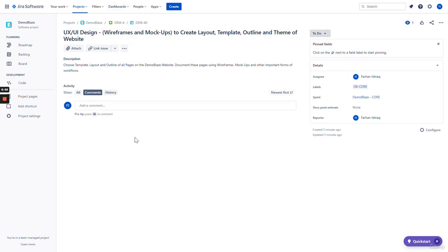For example, a story point number of 1 is a very small or very simple story point. It doesn't require much time, and it could be completed within an hour or two. A story point of 1 could be placed here.